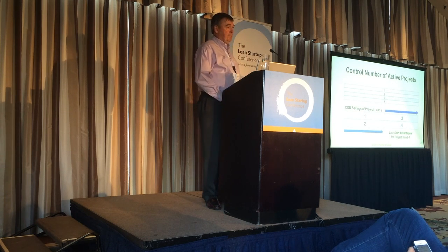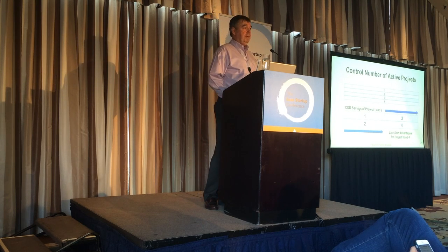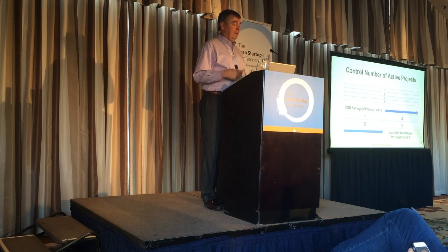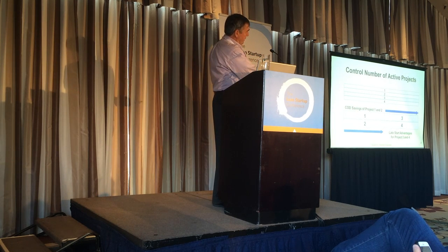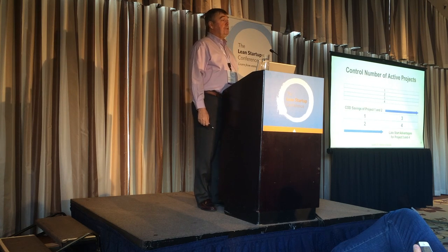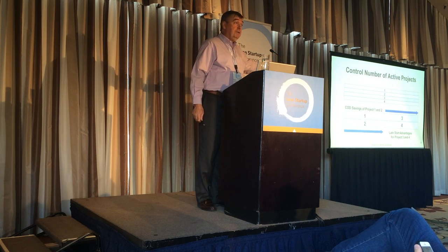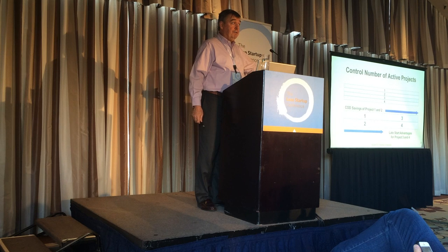This is a diagram I've used with senior executives. Senior executives are very smart, but they often have short attention spans. And so you want diagrams that are readily accessible, and this one has been tested by time. I explained to them, here's what you're doing. You're taking 24 months to develop 4 products in parallel. At the end of a 24-month period, you have produced 4 products. Here's what you could be doing. You could be doing product 1 and 2 in parallel, and then 3 and 4. In both cases, you will have 4 products done at the end of 24 months.